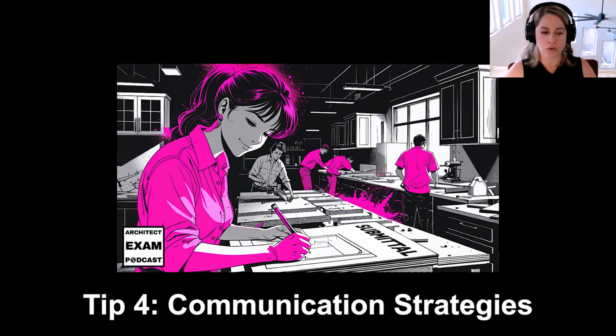During project meetings or scheduled meetings with the entire team, make submittals a standing agenda item and schedule it in project meetings in order to keep track and address any issues that come up. Don't just wait until a submittal is submitted in order to talk about it. If it needs to be a weekly or bi-weekly conversation, so be it.